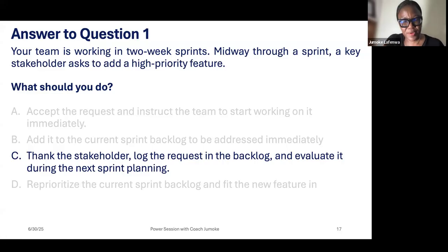When you finish this current iteration or current sprint, you present it to the product owner. The product owner has already updated the product backlog with this high priority feature from the key stakeholder. And then on the feedback on what to release at the end of the sprint, the customer will give feedback. And whatever the feedback is, the existing backlog can actually be reprioritized. The fact that it was prioritized the first time doesn't mean that it will remain like that.